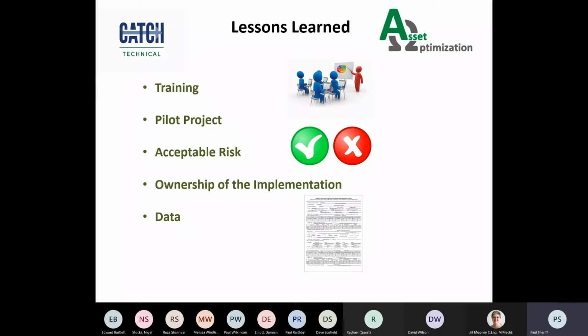And the validation of the data, like many processes in an RBI implementation project, needs a team approach. And the team approach will inevitably mean the assistance of people in operations and maintenance, because you'll need them to validate the data that's been collected. And these personnel won't initially see themselves as stakeholders in this type of project, and they may well need some persuading or even educating to demonstrate their importance to the project.